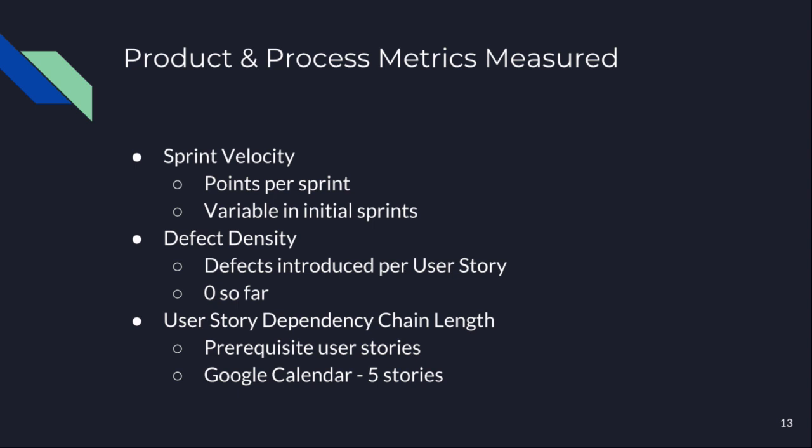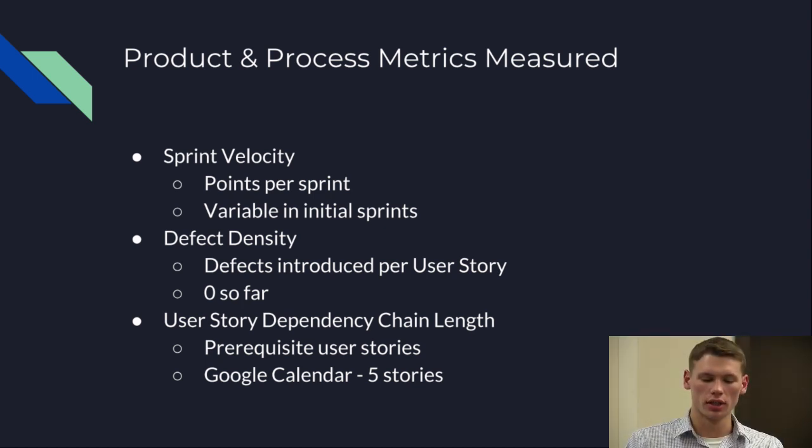To keep an eye on how the project was progressing, we chose a couple metrics that we thought would give us the most value, both internally for the team and for the coach and sponsor. Given our design methodology, we chose sprint velocity so that we could have an idea of exactly how our project was progressing. Initially, our sprints had varying completion for the points, considering we were working with an existing application, getting familiar with it, and ultimately getting deployments out, made for some variation within the points that we received.